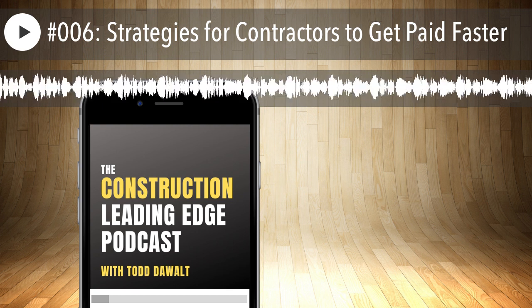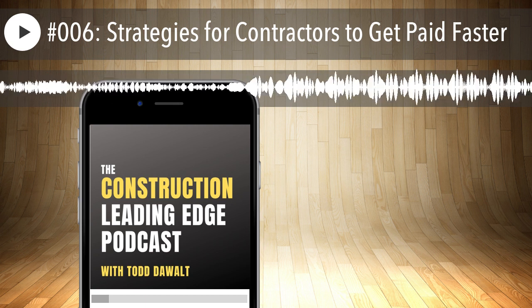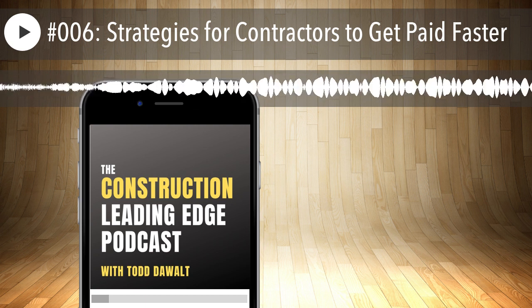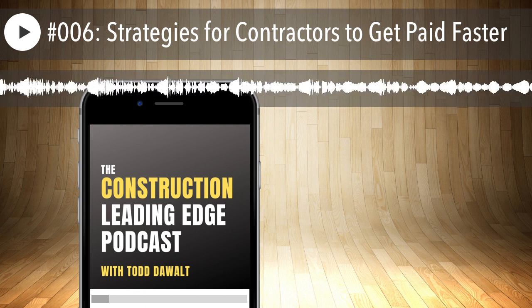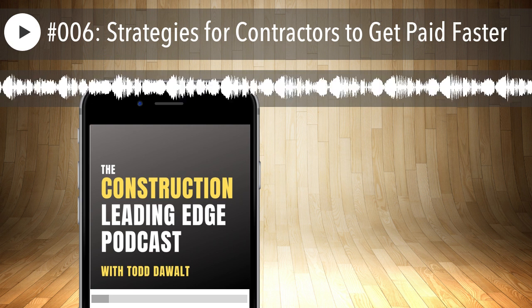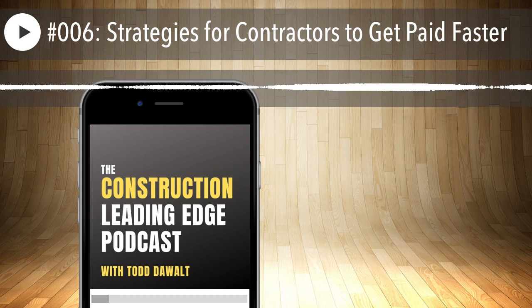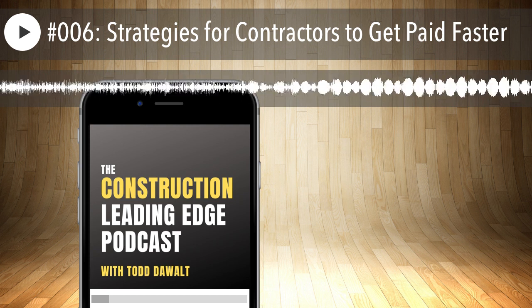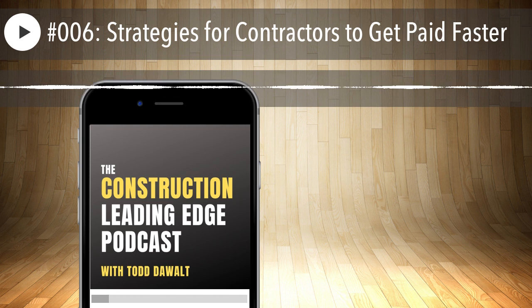It will get buy-in from everybody that's involved, and they will, in the process, buy into and agree to a time frame for review. They will agree that they need 2 working days, 5 working days, 10 working days to review it and get back to you with any issues or approve it and move it on to the next person. I hope that makes sense. And I can tell you from personal experience, I've used these strategies successfully to keep accounts receivable under control.